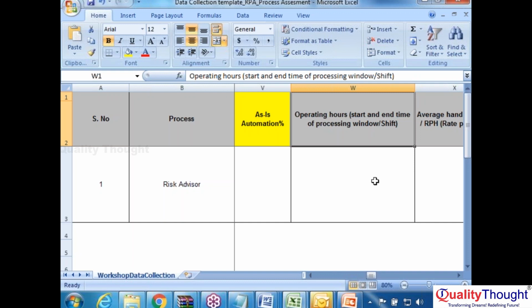A bot can work 21 to 22 hours. Why 22 hours? I will discuss in the infrastructure class, not now. But if you are giving any estimation for an RPA project, you have to say an FTE can work 8 hours and a bot can work 22 hours, not 24. We say 24 as a general answer, not in real time. It is 24 by 7 automation, but there will be downtime in infrastructure, so activities like upgrading and deployment you have to consider. So 22 hours.